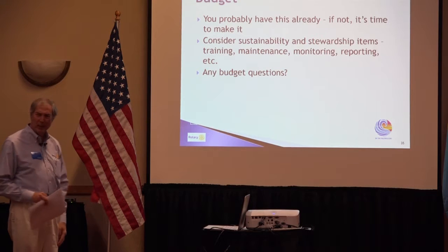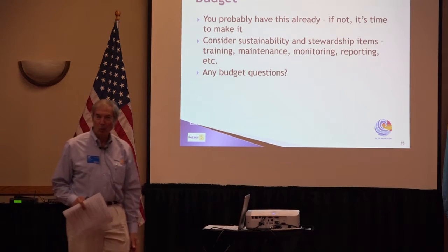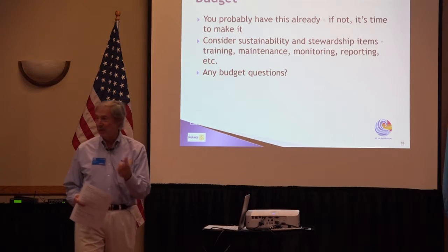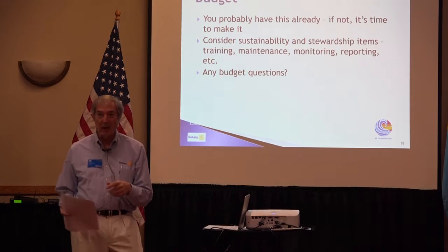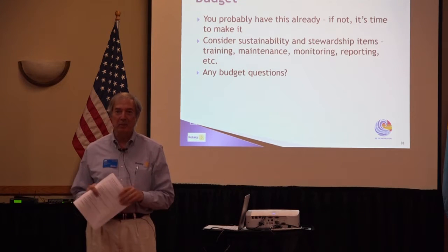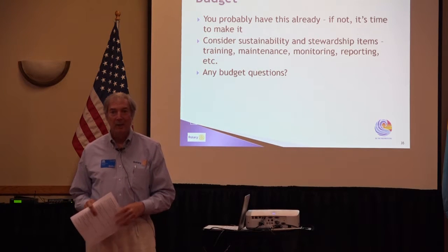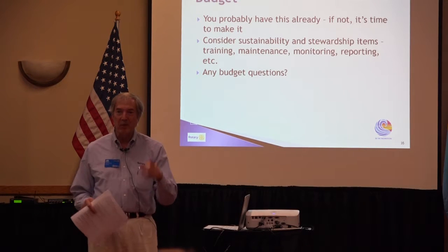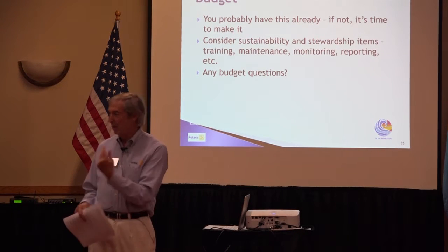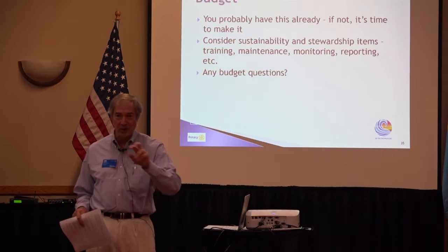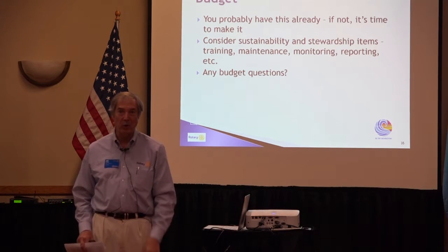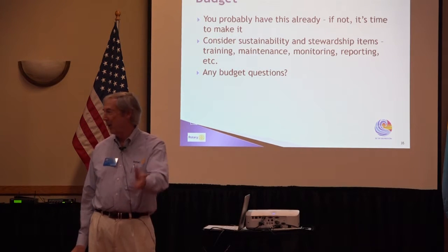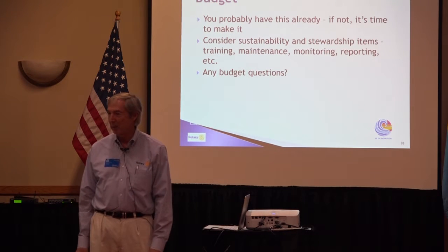Anyway, so any questions about budgets? One of the most common questions is about competitive bidding and things like that. If you have big items, you need to do competitive bidding. If you have small items, you can look for competitive bids even online. You can say, well, the price I'm getting in Haiti is 20% more than I can find the same item for at Home Depot in the US. I looked it up, and I think that's close enough because it's in Haiti, it's the one I want to use, end of story. And if you're buying something for $100, that's fine. You're not out of line relative to competitive pricing on whatever it is.